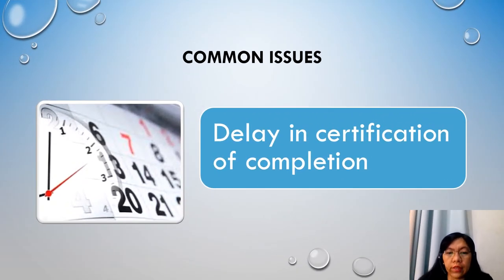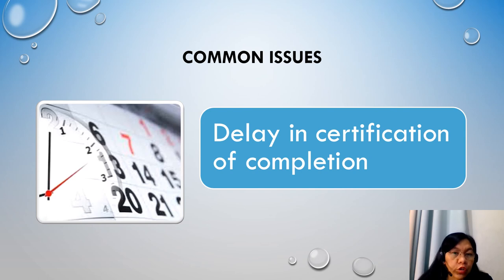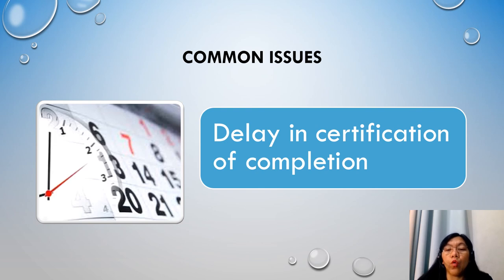The second common issue is delay in certification of completion. It is very common that at the end of a project, the date of completion is subject to some debate. In practice, the date of completion is sometimes agreed and formalized sometime after the actual event has occurred. There may also be a situation where the completion date has not been fixed as extension of time entitlements may still be in discussion. This may result in damages being deducted which shall be recalculated and deducted or refunded as appropriate at the next certificate, once the date of completion or extension of time has been agreed.